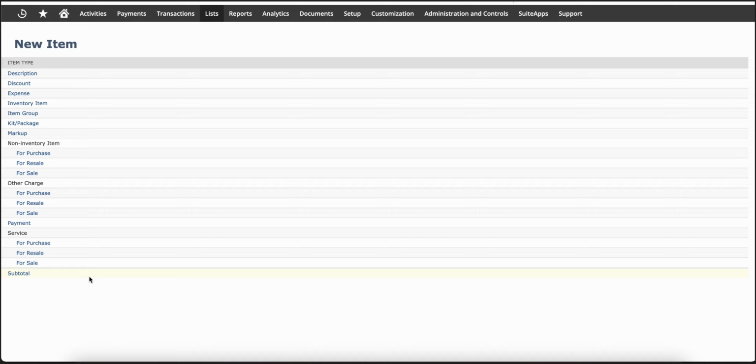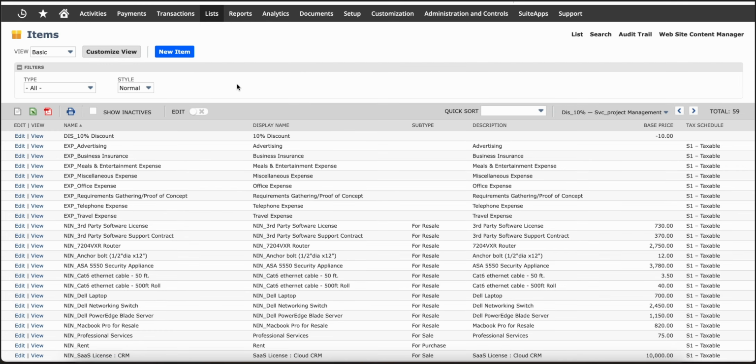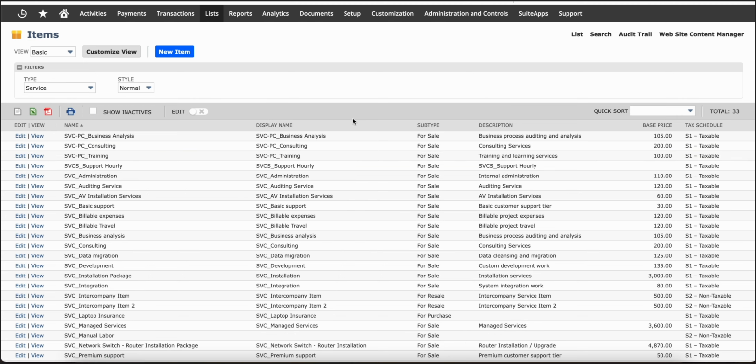whenever you are doing transactions for projects, it's expected that you're going to charge hours to that project. And to be able to enter time against those projects, you would have to be assigned a service item. That's why you have to have at least a list of your available service items and assign them to projects so that your employees or your resources can then enter time against them. So if you don't have any service item available, then you will not be able to enter time against projects.